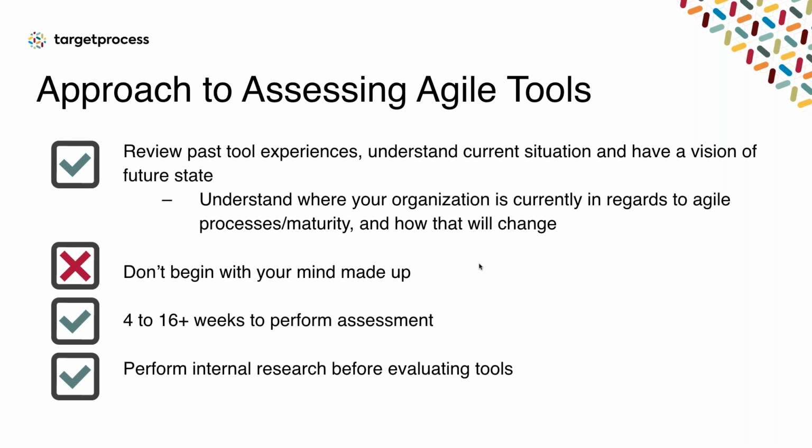Provide ample time, anywhere from 4 weeks if it's a smaller organization with just a couple hundred seats, and as long as up to 4 months if this is several thousand, 5,000 seats spread across a large organization. You need time to assess all the needs of the different divisions and departments and groups and the different roles. And I'll talk about that later on, how we go about finding out the needs of those different groups.